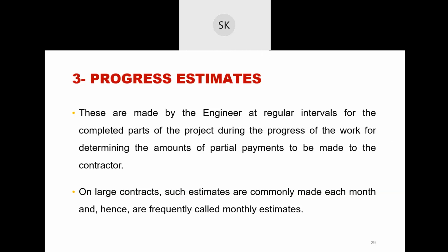And the engineer's estimate is the department's own estimate. Because if contractors show them their expenditure, the department has to cross check whether those estimates were correct or not. So the engineer who makes that estimate is known as the engineer's estimate.